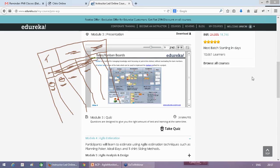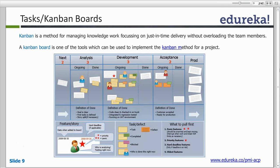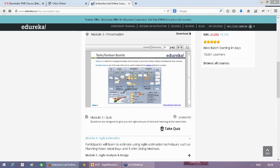This was just one example of how you can define your Kanban. Here you might have feature stories showing which stories you're working on across iterations. You might also have a risk section indicating identified risks — if a risk has been mitigated, you can erase it or cross it off. If it's getting overdue, you can mark it red or use some color coding. This is how you visualize it.